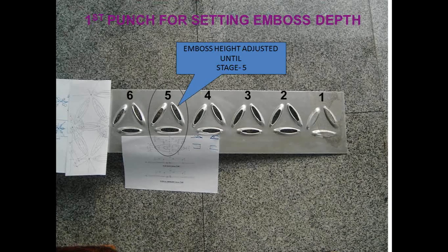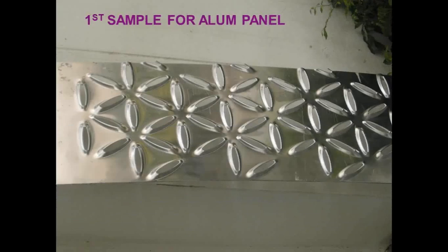Initially we had stainless steel of 20 millimeter thick as per the designer's idea, but we made it to a sheet, and we found the solution in Asia, where they were able to do the same aesthetic using a different methodology of fabrication. Once this alternate material was done, you can see the sample, final sample approved. So the dies were corrected, perfected, everything was done, then we were ready to go.